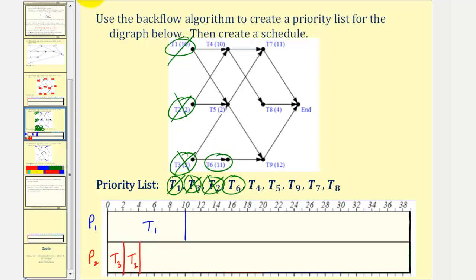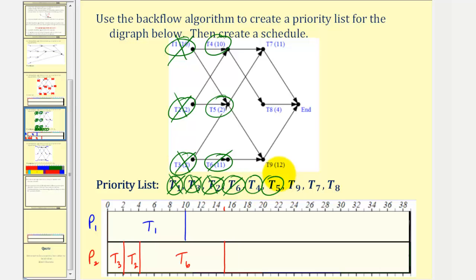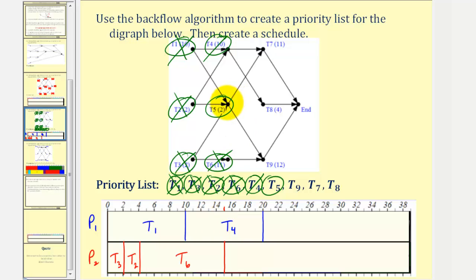Task six takes eleven hours, so four plus eleven is fifteen. Task six is now in progress. After ten hours, task one is complete. Notice how we now have some new ready tasks — task four is ready, and so is task five. Task four is the highest priority ready task, so task four is assigned to processor one. Task four takes ten hours, so ten plus ten would be twenty. Task four is now in progress. After fifteen hours, task six is complete. There are no new ready tasks, so task five is assigned to processor two. Task five takes two hours, so fifteen plus two would be seventeen.